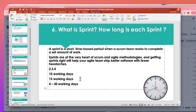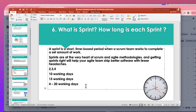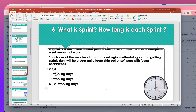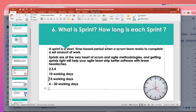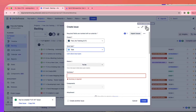Whatever user stories are picked in a particular sprint must be completed within that sprint's timeline. For a two-week sprint, all stories must be done in 10 days; for a three-week sprint, 15 days; for a four-week sprint, 20 days.